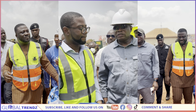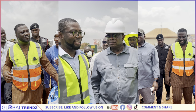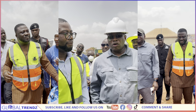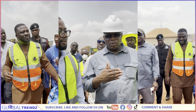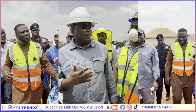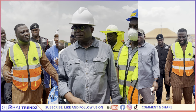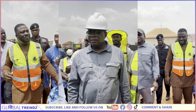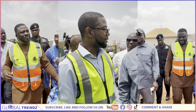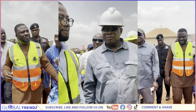So you've been paid 41%? At the moment, we are doing quite less than that. Were you paid 40-something%? Or that is the money available? That's the money available. But the way you said it is as if you've been given the money. In terms of financial progress, we are doing less than 40%, but we are more than 60% of physical progress on the ground on phase 2. Same applies to phase 1 on the interchange as well. Also from Afri-Exim? Also from Afri-Exim.